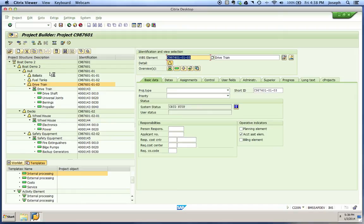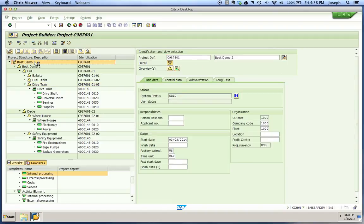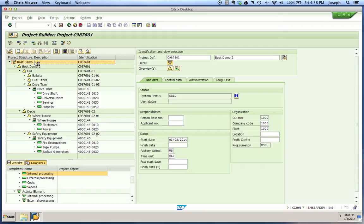One thing we need to remember in our Project Builder view is we always want to schedule from the top of our project, or our project definition. We want to make sure when we command it to schedule that we're up here on our project definition. We've highlighted our project definition and can now command it to schedule.